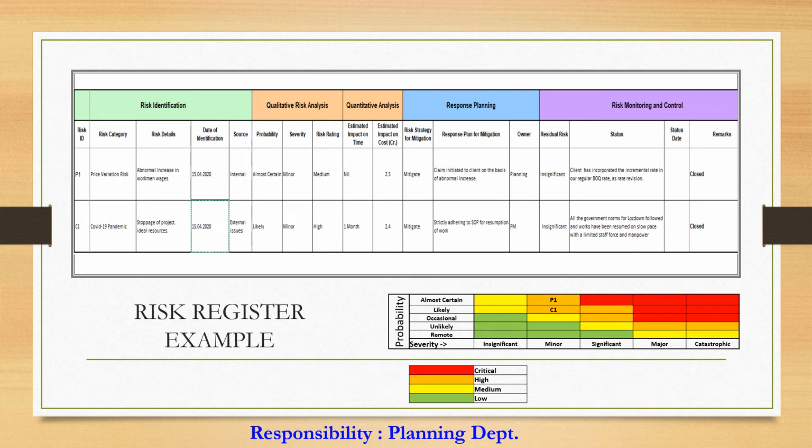We concluded this, and based on it we made an action plan of strictly adhering to the SOP of the government. This is the response plan. This response plan will be monitored periodically to see whether we have controlled the risk or not. This is how risks are identified, monitored and controlled.